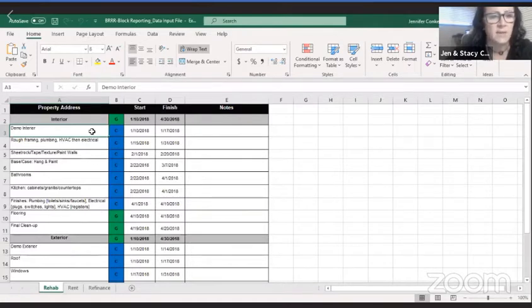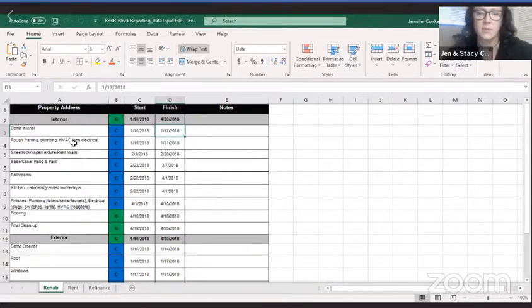And then you can sit down with the contractor and go through, okay, what are the timelines on that? So if we're going to demo the interior, are we demoing the exterior at the same time? And you want to really nail down, when is he or she going to start that demo? And when do they think it's going to end? Like, when will that process be done? And is there anything else that they can be doing simultaneously during those processes?